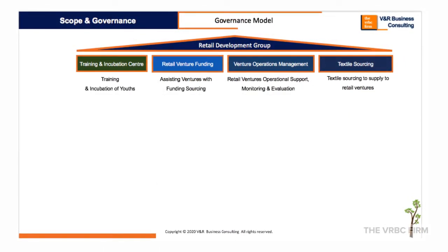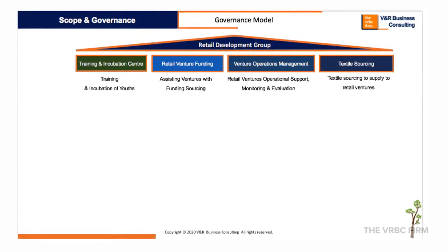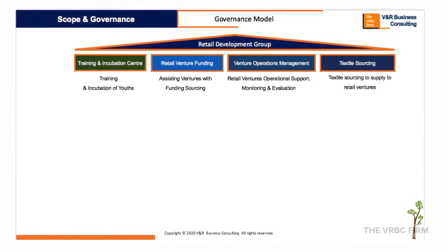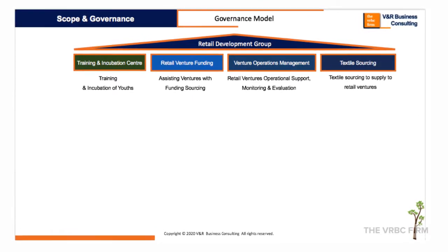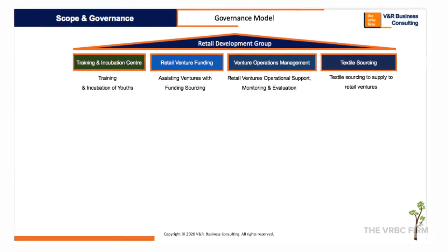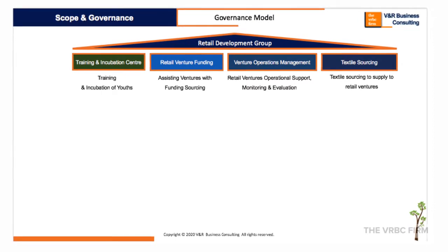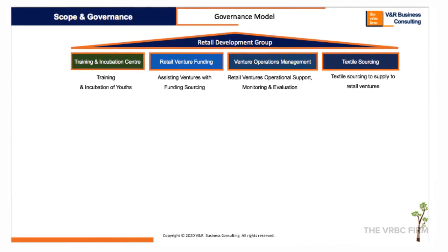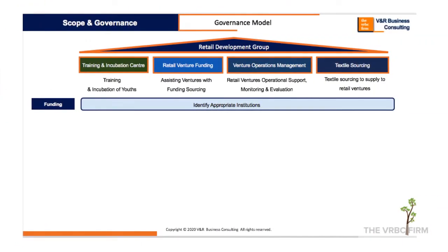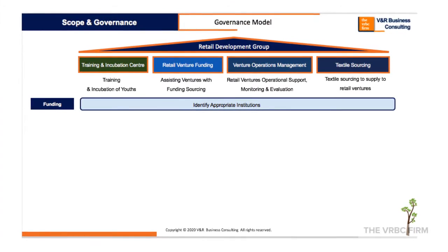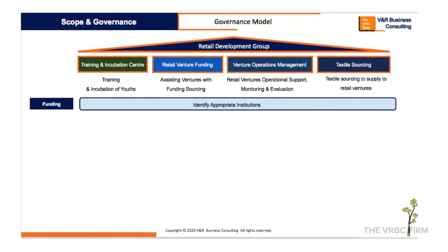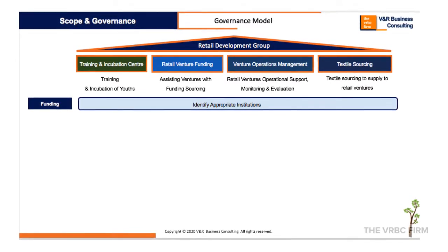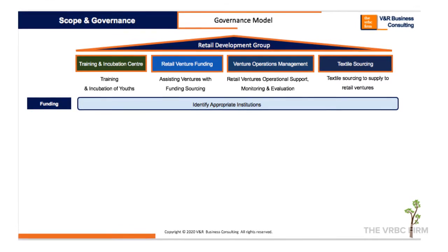Easy enough. We move on to the governance model. The governance model mainly deals with identifying 4 levels of stakeholders and partners. In this context, the people the program is mainly accountable to are the entities putting money on the table to make the program happen. The best approach is to clearly define for each component who these entities are. This will help clearly define the role of each of these entities at each stage when you eventually define your RACI model.